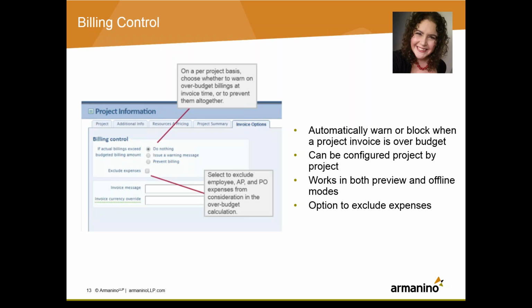So the good part about that is once you go over budget, you do have line item control. If you have said that you want to prevent billings altogether over that project amount, you can change or delete line items from that bill so that your project billing does not exceed the agreed upon maximum. In that instance, you can go back and negotiate a change order if needed to make sure that you can continue billing those other items that were coded to your budget.